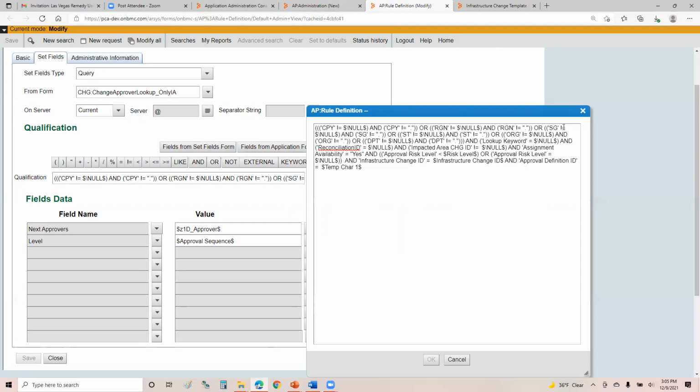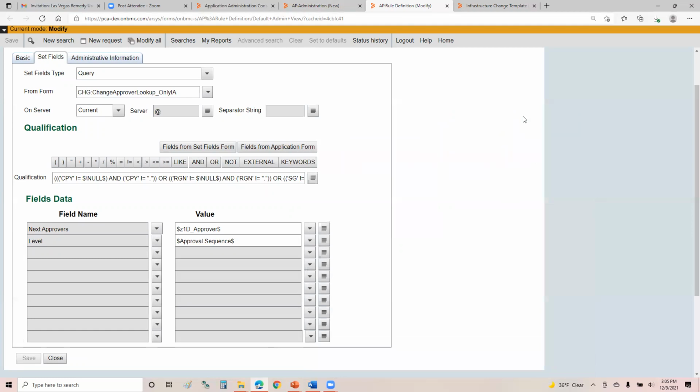What determines when an approver gets the notification that he has to approve something? Somebody will ad hoc add an approver, and it seems like they get the approval right away. They do, but they're still in planning in progress status. Right. And so they go to approve it, and you say, sorry, you can't respond to active approval.